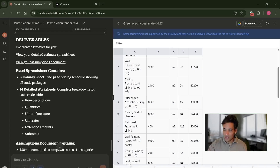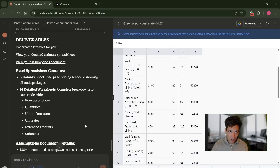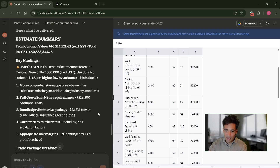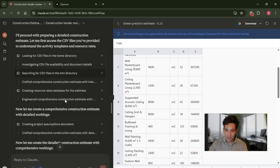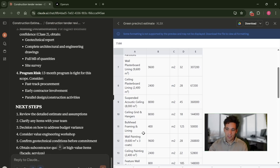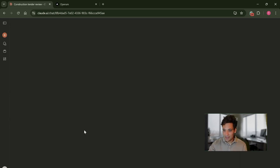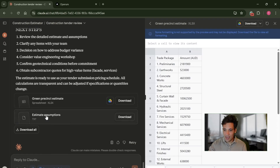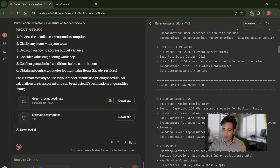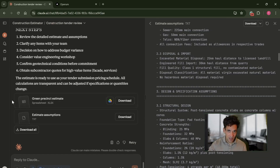This is a good first cut. You can go and change it, edit it. The other thing you can do is get AI to check its own work and advise if it's made any mistakes. The way I'd do this is to start a completely new chat — because the context the model has is what you've provided plus the history of the chat, so if you ask it to check its own work in the same chat, it's not starting from scratch. You'd create another chat in your estimating agent, upload the tender documents, upload the estimate, and get it to check against those. That is essentially how to produce a construction estimate using AI, and it's also given us an artifact with all the assumptions it had to make, which we can work through and correct.